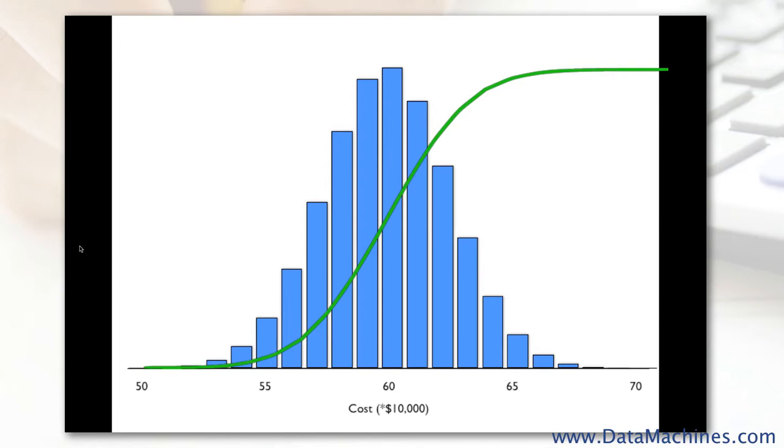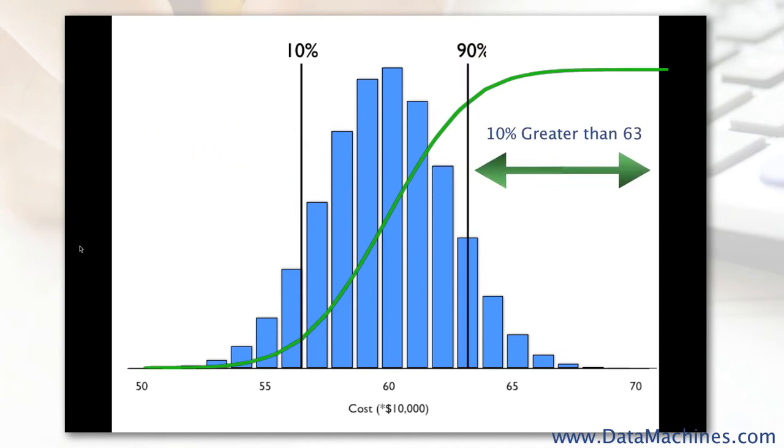Based on the model, we can see that there is a 10% chance that it is going to be less expensive than 56, and a 10% chance that it is going to be more expensive than 63, which tells us that there is an 80% probability that it is going to cost between 56 and 63, with the most likely value around 60, which is the median.